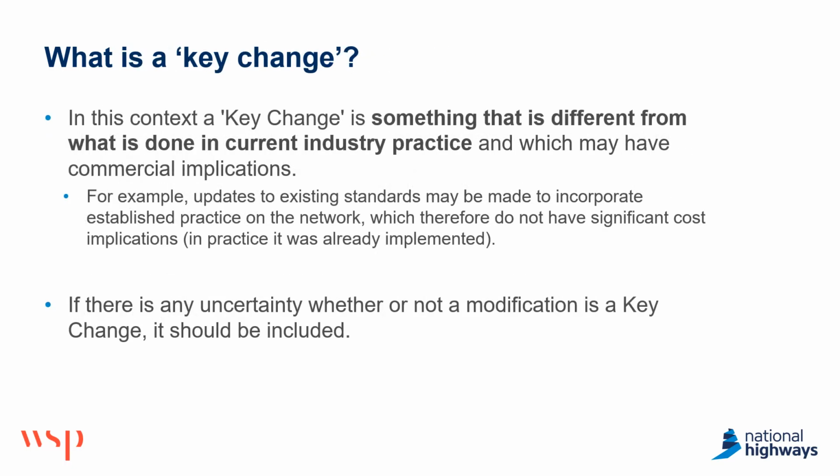So what is a key change? In this context, a key change is something that's different from what is done in current industry practice and which may have commercial implications. For example, updates to existing standards which have been made to incorporate established practice on a network do not have significant cost implications, as in practice it was already implemented. However, if there's any uncertainty about whether or not a modification is a key change, it should be included.